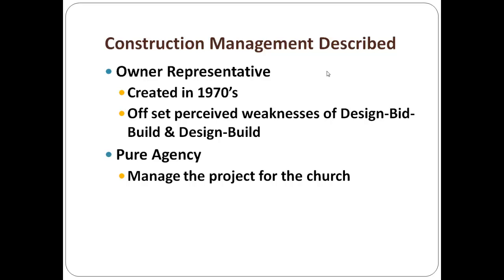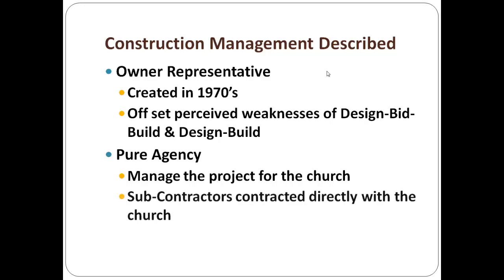Here, the pure agency construction management delivery system is where you manage the project for the church. So the GC, and I think most every state that allows construction management requires that the construction manager be a licensed general contractor and qualified to do your project. So this GC is now going to be a construction manager, and he is going to manage the project for the church. Okay, so a licensed construction manager is going to manage the project for the church.